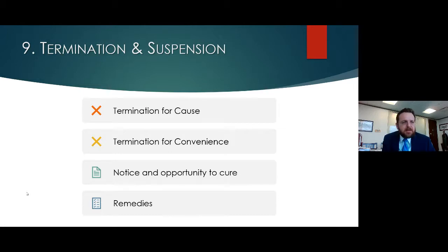If the non-payment is a small sum that doesn't affect your ability to finish the project, then it would not be a basis for you to terminate. So in sum, what does that mean to you? If you haven't been paid, if that non-payment threatens your ability or makes it impossible for you to continue to afford to do the project, then it's a material breach, and you should have a basis for termination.